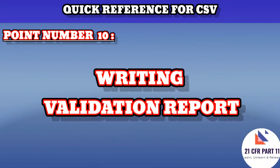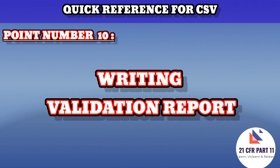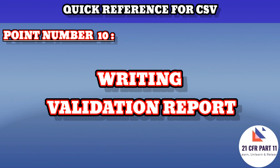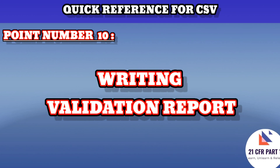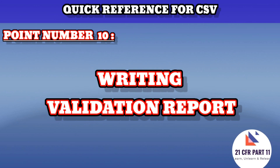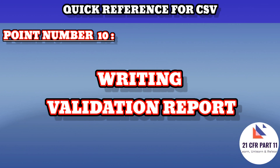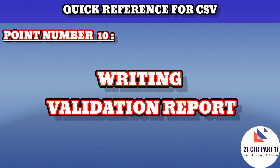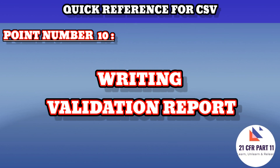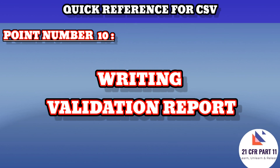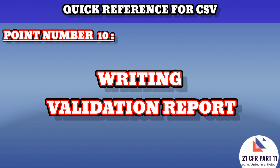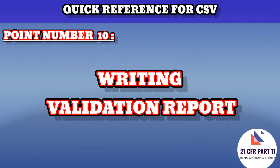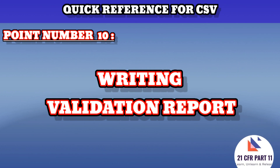Point number ten covers writing the validation report. This should include a brief description of each major project activity, reviewing all preceding validation activities and indicating the status of the system prior to implementation into a production environment. Deviations from the project plan should be documented and risk assessment should be performed. The approver of the validation report is a prerequisite for release, and all risk assessments for deviations must be completed while writing the validation report.